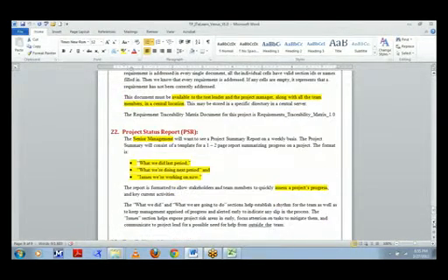And the project status report is also very important for senior management. They will be looking for what we did last week and what we are going to do in the next two weeks. So they would like to get the project status. This is done on a weekly basis, just to assess the project progress for the higher management.